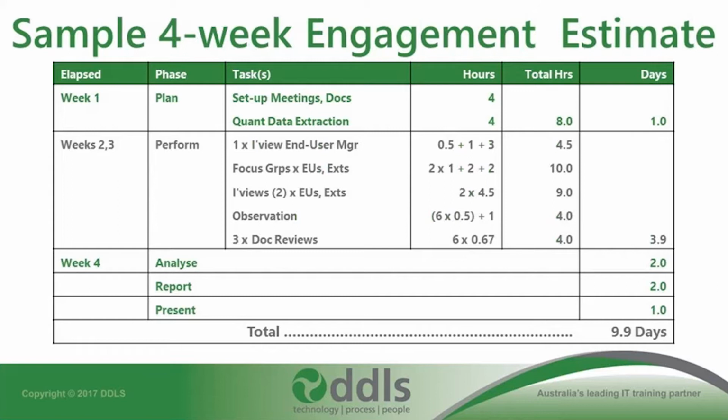You might spend a little bit of time, say just one day in week 1, setting up meetings, inviting people to interviews, focus groups, reviewing documents that are readily available, extracting data from dashboards, any quantitative data that's readily available. Weeks 2 and 3, you might go and interview people, conduct focus groups, do observation. Maybe you've got people filling in logs or diaries, so you're capturing quantitative data as well, reviewing some of the documents that weren't readily accessible. But leave time in week 4 to analyse that data, to put together a report and a presentation.